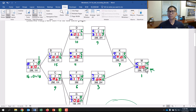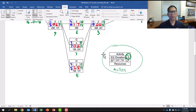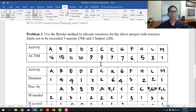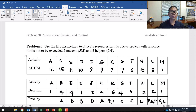Activity B: 16 minus 1 (late start of B) equals 15. C's late start is 7, so 16 minus 7 equals 9. Similarly, we calculate the active for all activities and record that in the PRO table, listing activities from A to M in the first row, easily copied from the network.